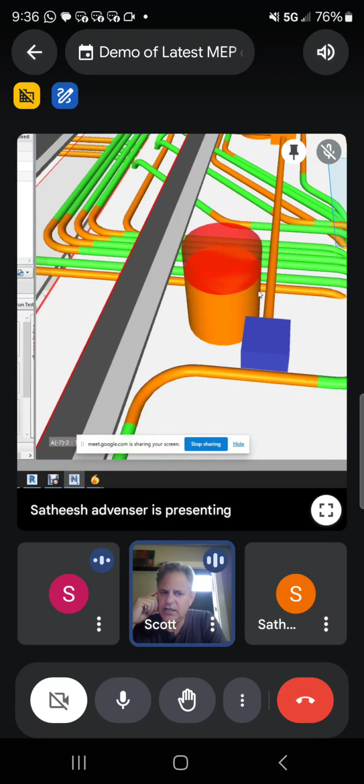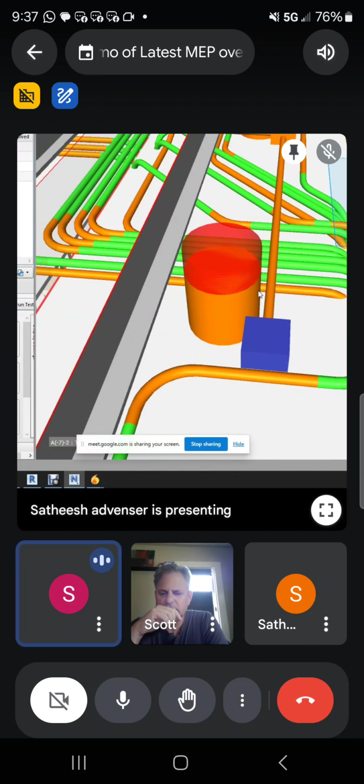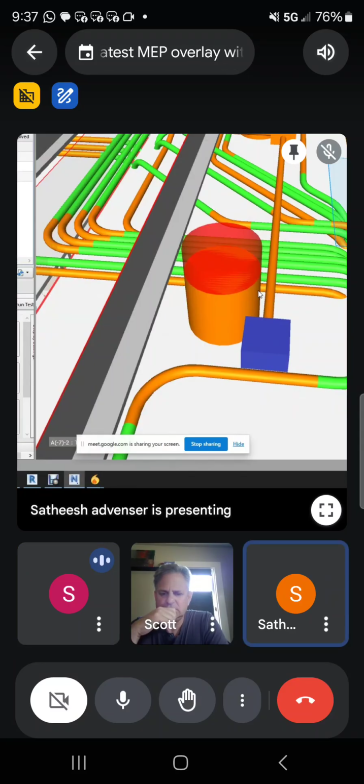It seems like you're so sophisticated that it should be able to be done pretty easily. Yeah, because he runs a clash detection on the software itself. It tells you all the clashes. Right now, my understanding is you've done more of a structural clash detection, but would you also be able to run clash detections from another perspective for wires and things like that, Satish?